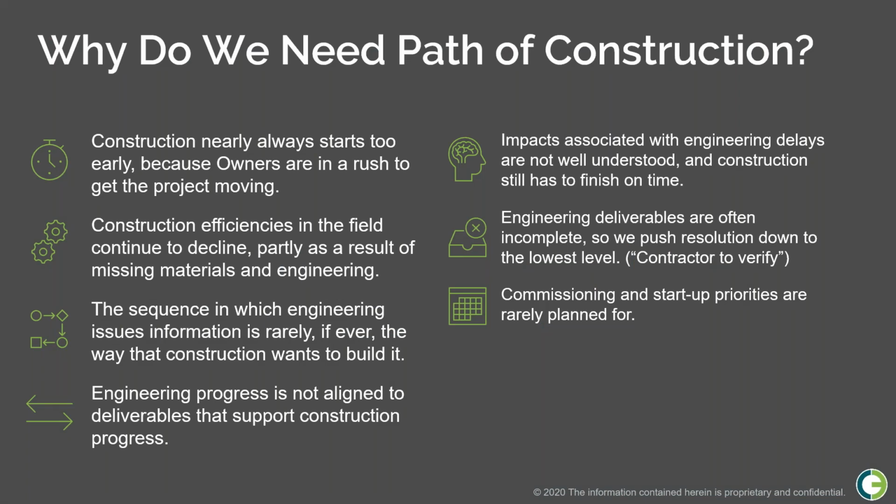Construction nearly always starts too early. Everybody's in a rush to get the project moving. Everybody wants to get to the field. There may have been delays in engineering, but as soon as there's that first batch of drawings, quick, go to the field, start building stuff. And then unfortunately, as we see far too often, we get out to the field and things grind to a halt because we can do a first few weeks of work and then we run out because we haven't got the rest of the engineering behind us to continue effectively.